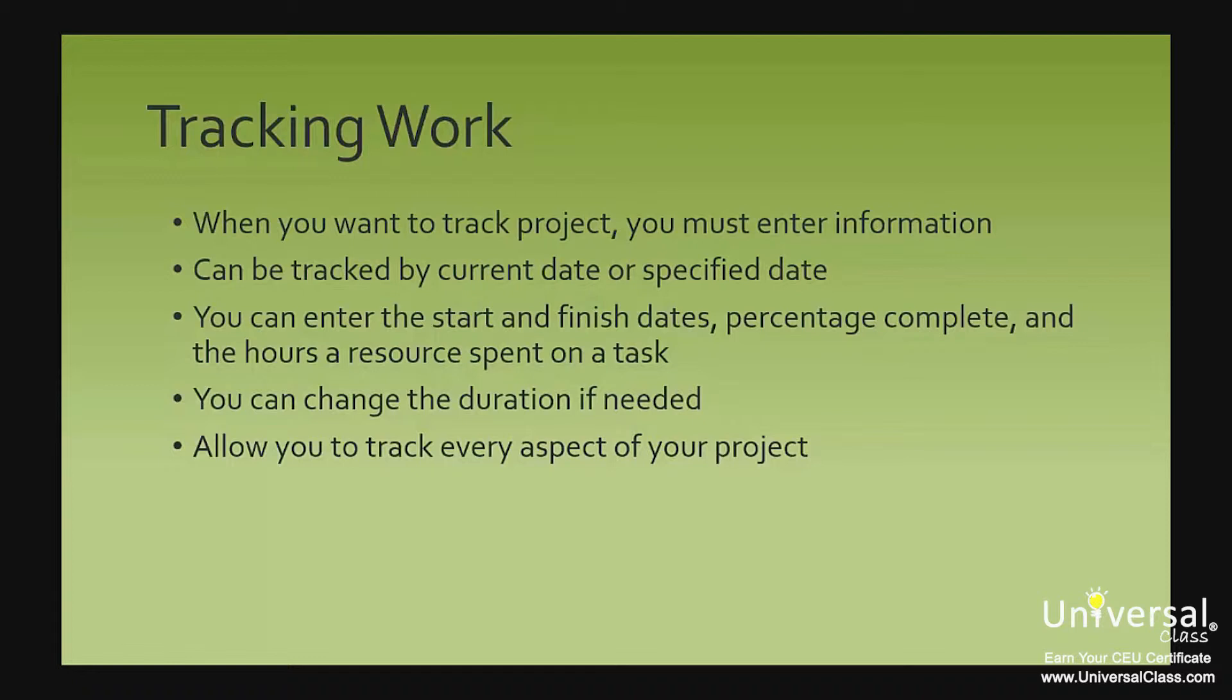In addition, you can enter the actual start and finish dates of tasks, the percent complete, as we learned in the last lesson, and the hours a resource spent on a task. If you think a task will take more or less time than originally scheduled, you can change the duration.